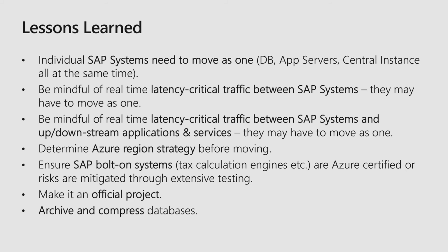Also, SAP has a ton of bolt-on systems, as you know: text processors, tax calculation engines, batch job systems. Make sure those are all either Azure certified or you have extra testing. A lot of these companies are kind of small to mid-sized. They don't necessarily do cloud certification.